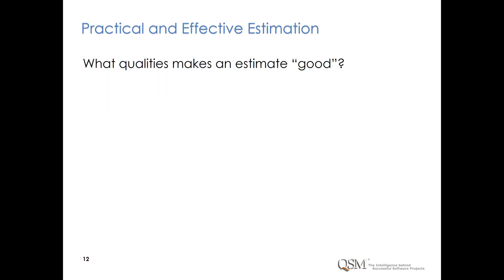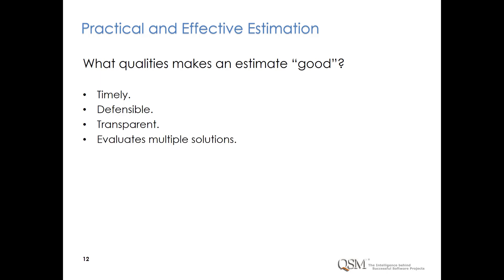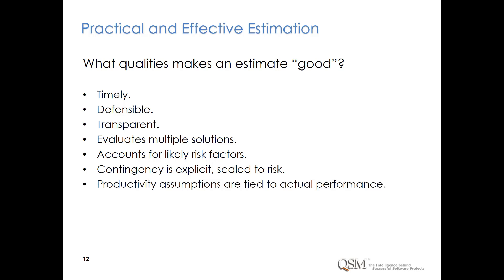What we need is a practical and effective estimation solution. The qualities that make an estimate good: it's timely — can be performed when it's most needed; defensible — backed by data; transparent — the assumptions are known; evaluates multiple solutions, allowing us to explore a range of potential outcomes; accounts for likely risk factors; contingency is explicit and scaled to risk; productivity assumptions are tied to actual performance; easy to revise; and provides a consistent and repeatable approach.